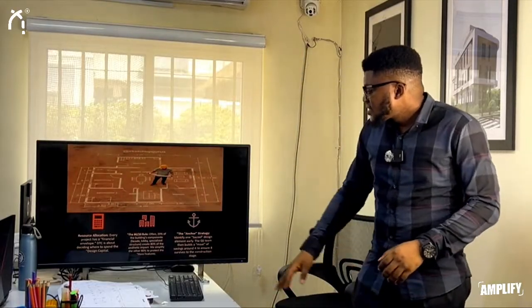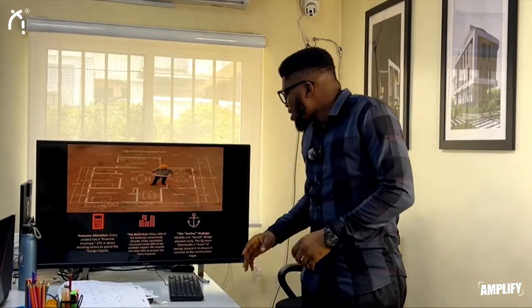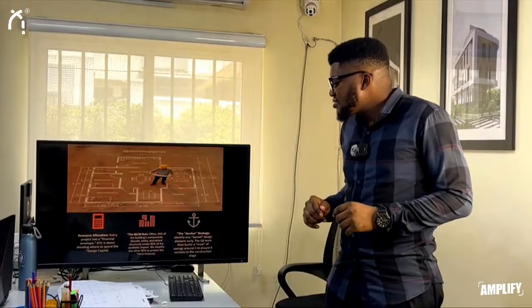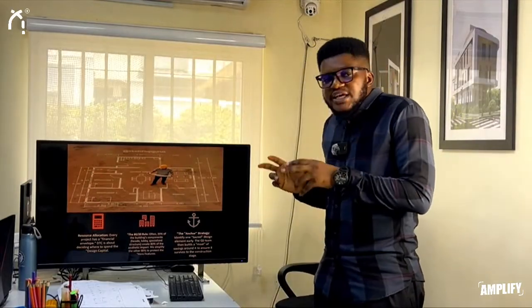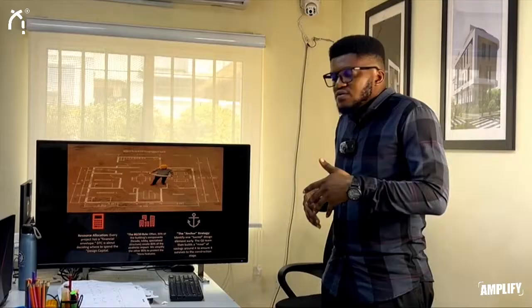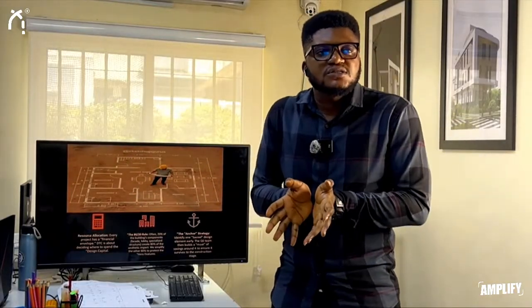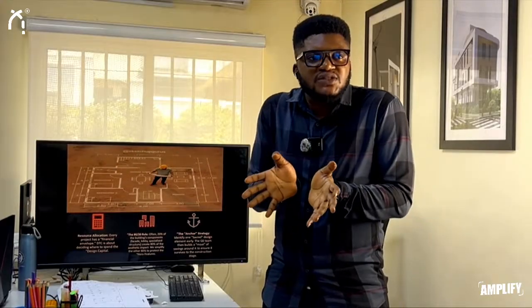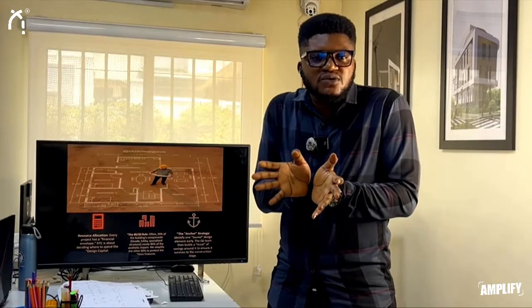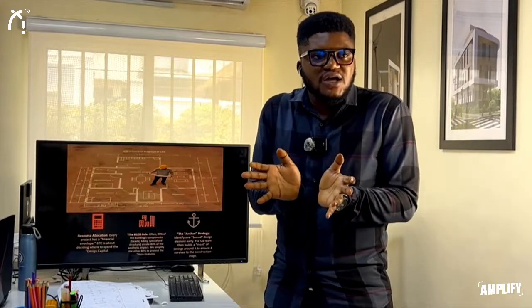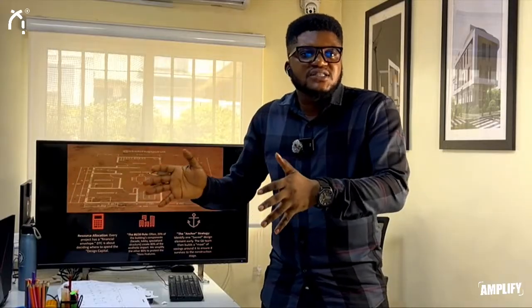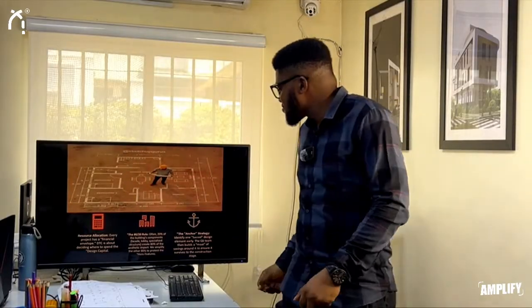Anchor strategy. We identify one sacred design element early enough in the design stage, so that the quantity surveyor does his costing around it. He's able to protect that particular design, that particular facade, that particular thing you are trying to communicate. He protects it, and then makes sure that on site it is implemented just as you want it.